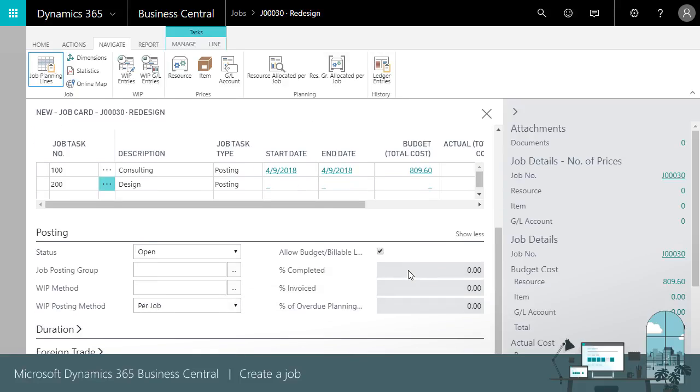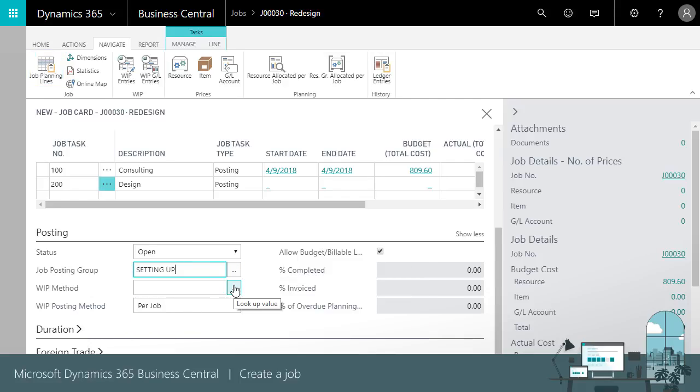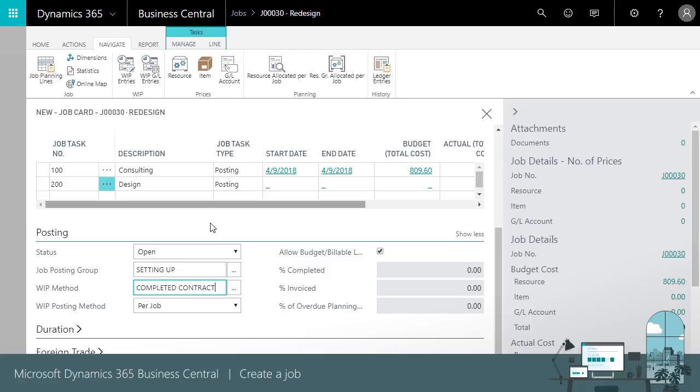The Posting Fast tab is also important. We should choose a Job Posting Group and a WIP method. We can assign Job Posting Groups per job or, in the Job Setup window, we can specify a Job Posting Group that Business Central will assign to new jobs.